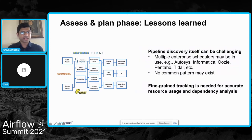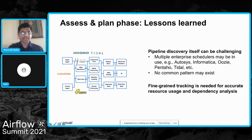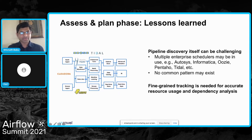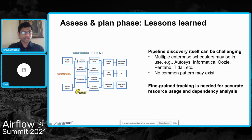Two key lessons we have learned: first and foremost, don't underestimate the complexity of pipeline discovery. A lot of the time in these environments, multiple schedulers might be in use. We have seen customers running Tidal along with Informatica and Oozie pipelines simultaneously. Worse, there may not be any common pattern in how these pipelines work — how they access data, how they schedule apps, how they name apps, or how they allocate resources. All of this means you need very fine-grained tracking from a telemetry data perspective to do good resource usage estimation, understand dependencies, and map the complexity and cost of running these pipelines in a newer environment.